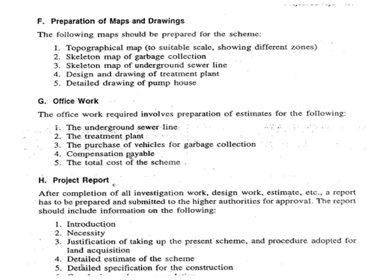Design and drawing of the treatment plant and detailed drawing of compost are also required. The office work involves preparation of estimates for: the underground sewer line; the treatment plant; purchase of vehicles for garbage collection; compensation payable; and the total cost of the scheme. After completion of all investigation work, design work, and estimates, a report has to be prepared and submitted to the higher authorities for approval.